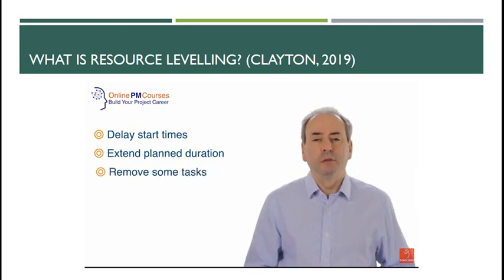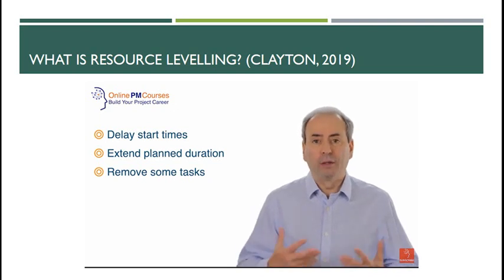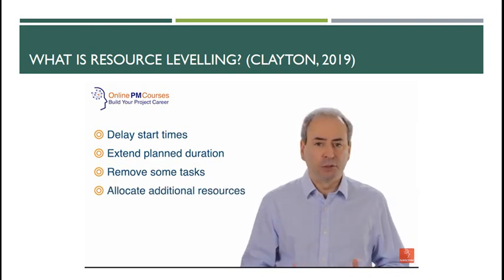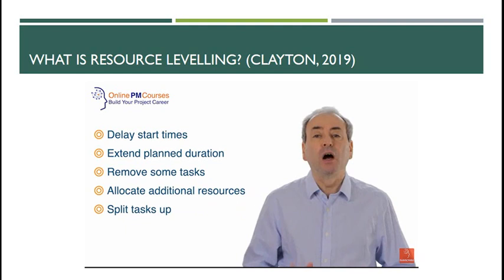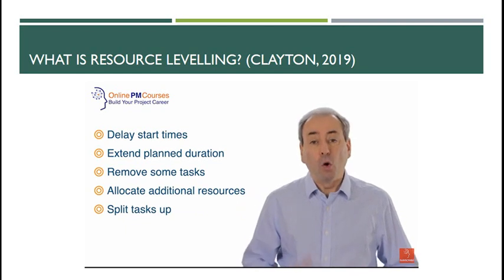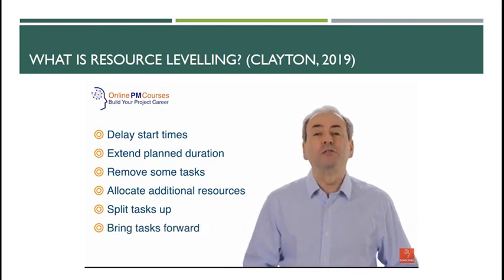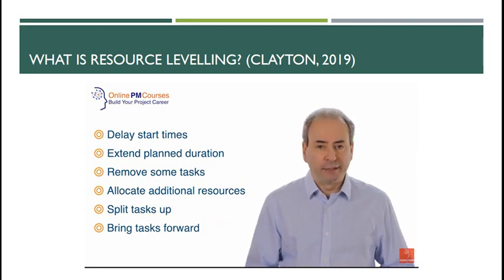We can remove some of those tasks, or we could allocate additional resources, new people, to add to the resource team. We can split tasks up, or we could bring tasks forward so that they can be done before the crunch period when our resources would be over-allocated.